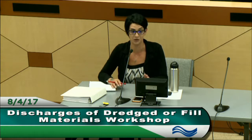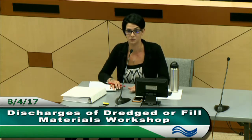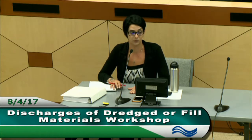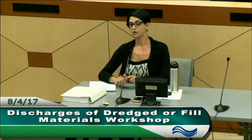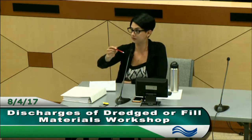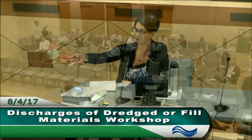So the process would be, you have an application, you're proposing a project, come talk to us as soon as you start talking to the Corps. We get a pre-application consultation so that we can go over the alternatives and work with you to determine the preferred alternative that works for both agencies. There's another question back. Javier, do you want to have a question? Here's the microphone for you.